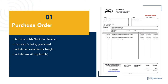The purchase order ideally references our Noise Barriers quote number. We do lots of quoting and there might be multiple revisions on an order, so we'll take the most recent quote number and attach that onto the purchase order. Ideally all of the materials are split out into individual line items — this helps us with internal billing. If you have a large barrier wall, there might be panels, structural steel, kickers, additional bracing, installation, freight, and taxes. Splitting those items out helps us ensure we're billing the correct amount rather than just the job in totality.